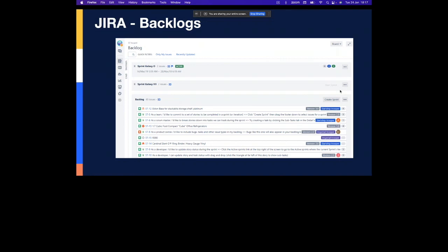So this is what we do at a product grooming session, where you look at the backlog, take the topmost items, groom them, and then take them to a sprint backlog and keep them ready. While you are working on the first sprint, in the middle of it, you do the grooming for the next sprint.